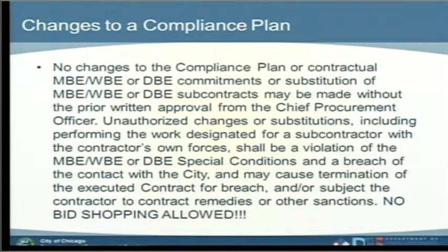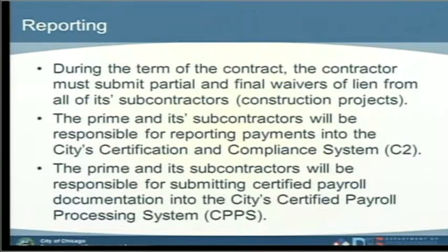No bid shopping is allowed, meaning if you submit a compliance plan saying that you're going to be hiring a subcontractor, don't go around them trying to find somebody else to replace them once the contract is assigned to you. That's not allowed.